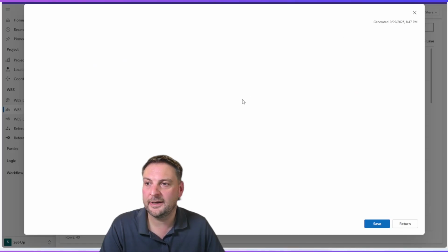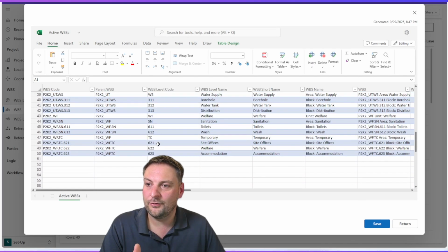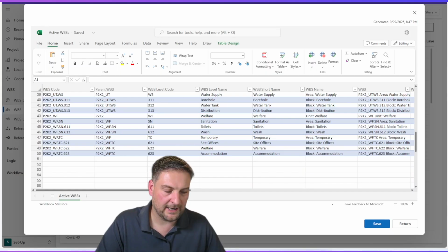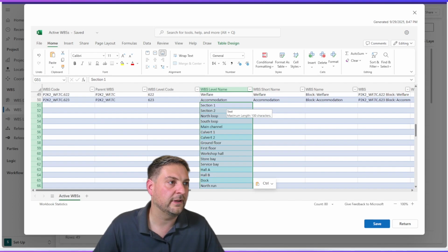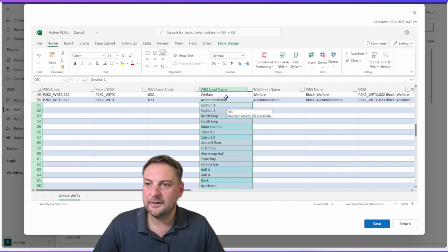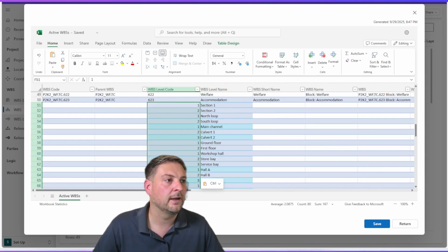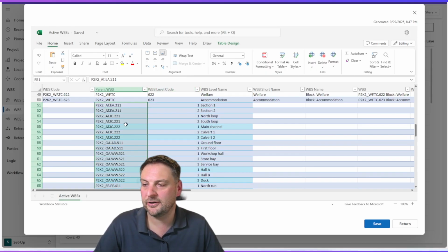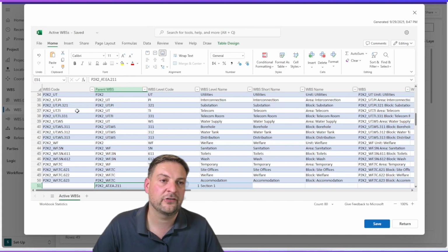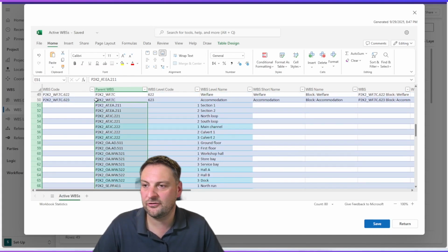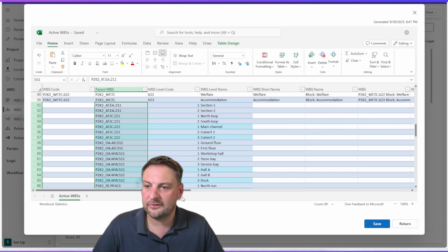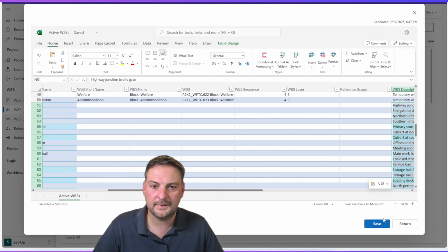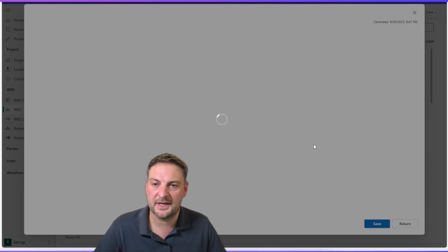Same process, open in Excel Online. Again, we see the whole set being available. And I will do the same thing by providing the names of the modules that I want, the coding that I want every module to have, and a lookup to the parent WBS, which now exists in this system, right? So I have prepared this, made sure that the parents actually exist. And then let's add the descriptions as well, which is this column, add the descriptions, and hit save again.